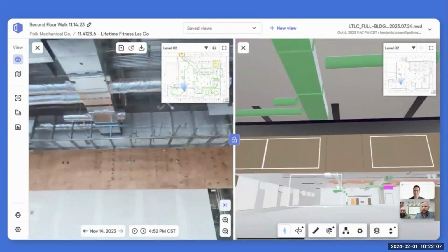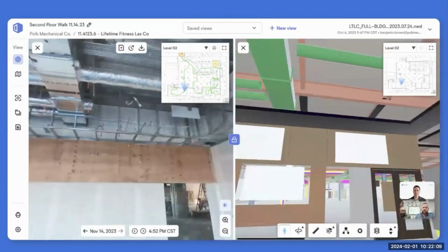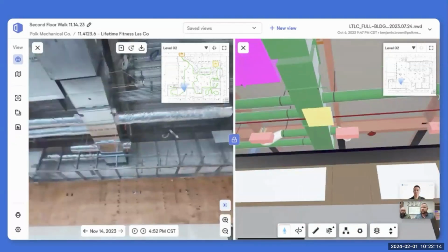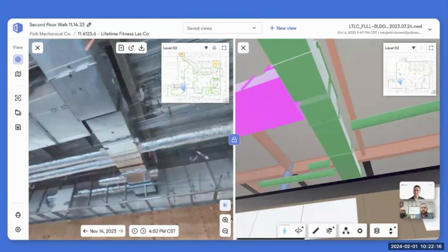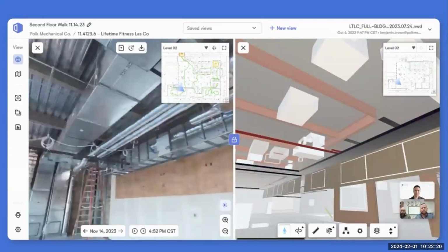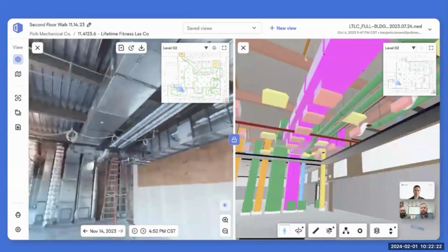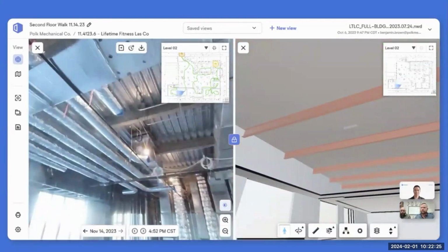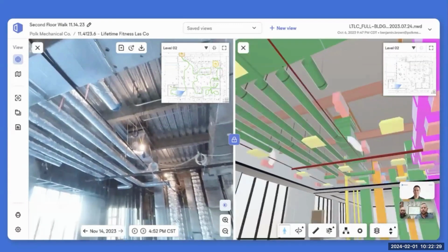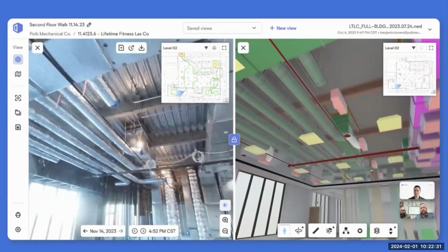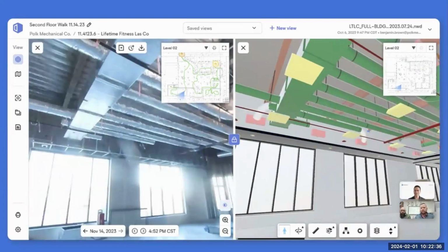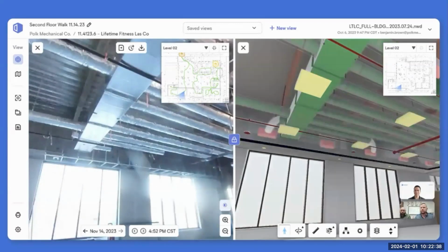Another thing, and Brandon may have mentioned before, is, for us, it's tracking, right? So knowing how much we've installed or how much hours we've burned versus what we've installed. This is a great visual aid. You can see there's diffusers left to install in this system, and there's some flex duct and stuff that we've capped off. But for the most part, we're probably roughed in here. So as long as we're checking, how much time do we spend on level 2 area B or whatever this area was, and then back checking that. So it's just a great visual tie back without having to make a trip to the job site to do that site walk for 4 hours.